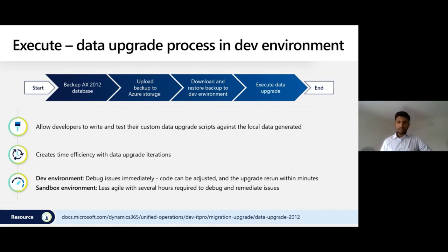That gives a huge advantage, because when there is an issue during the data upgrade, you will be able to troubleshoot it and fix it in your dev environment before you move on to the sandbox. Also, when you upgrade your data, other than the standard data, you will also have data related to your customizations. For you to move your customizations data into D365, you might have to write upgrade scripts. You will be able to write the upgrade scripts and also test them in the dev environment.